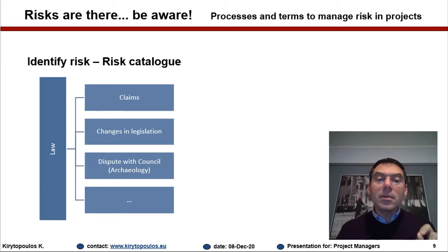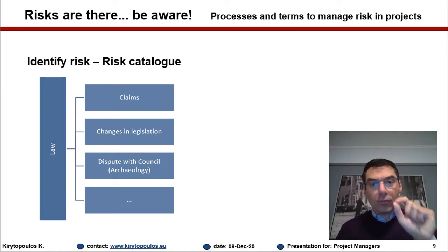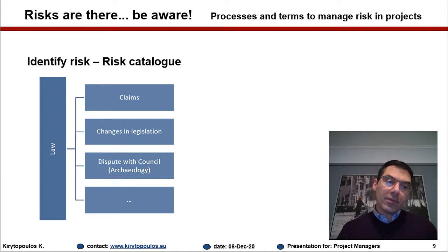This is much easier to be controlled, and not control in a way that we're going to change what the government is going to say. This is a typical external risk, so we cannot do something about it. But we know what to monitor. Instead of monitoring the legislation as a whole, we might want to focus our attention on monitoring a very specific part of the legislation that is changing and affects our project.